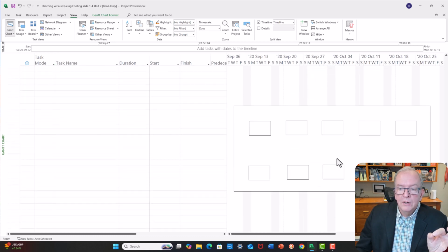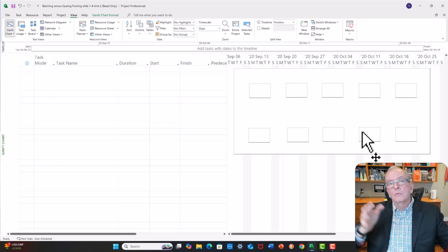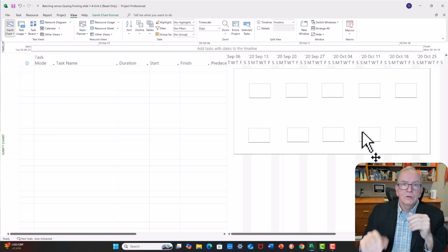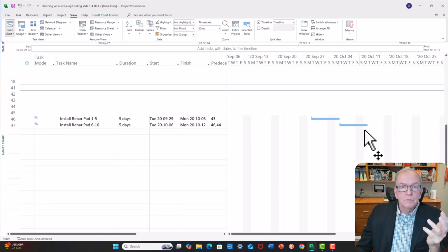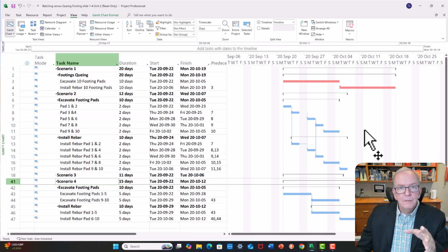Like if I go down here and we look at this, well, you might decide, okay, we could do batches of 2, but maybe we don't do it like in sequence, like 1, 2, 3, 4, 5 batches. Maybe we do 1, 2, leave a space, 3, 4, leave a space, then you basically come back here, 5. So you're actually giving yourself a double space all the time. That could be a consideration if it's about having a little bit more space. That would make a big difference perhaps in a lot of scenarios. So you got to be thinking about space. You've got to be thinking about flow.